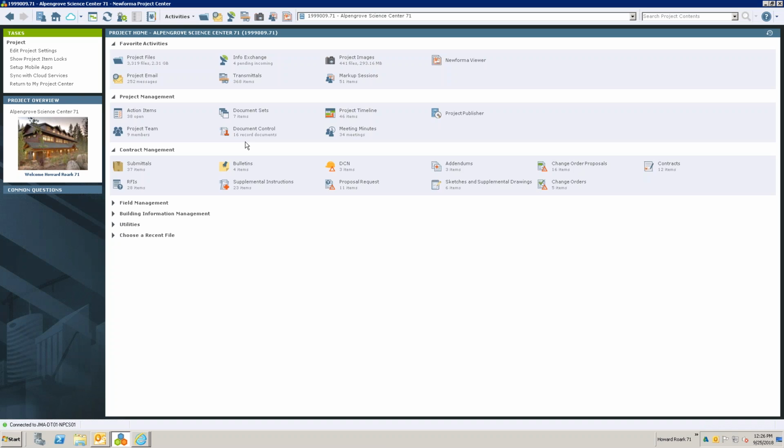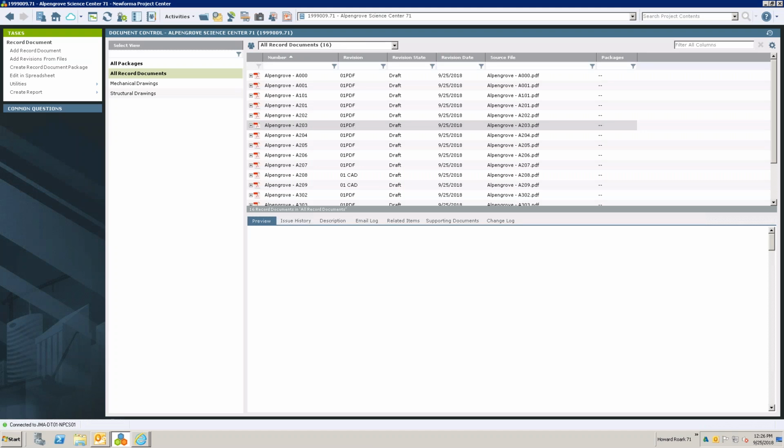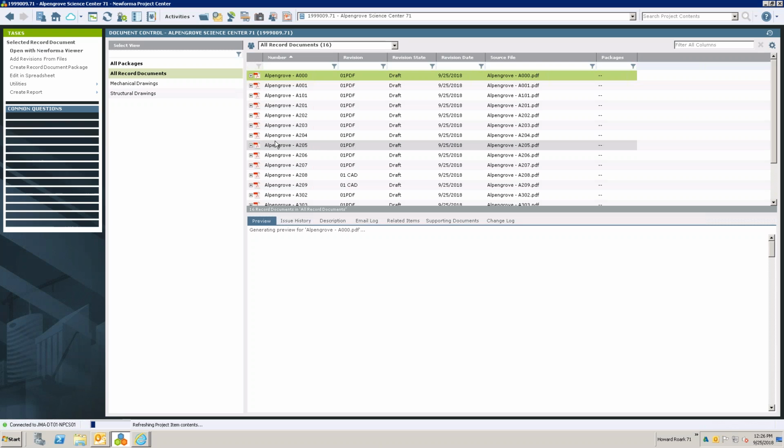Okay. So from document control, you're issuing a transmittal with a bunch of files. So I'm saying if 9 out of those are issued for construction and 1 is going out for review. Right. Can we specify that? So you can choose which files you issue, and you can even have overlap, but you could highlight some files and then say issue selected record documents.